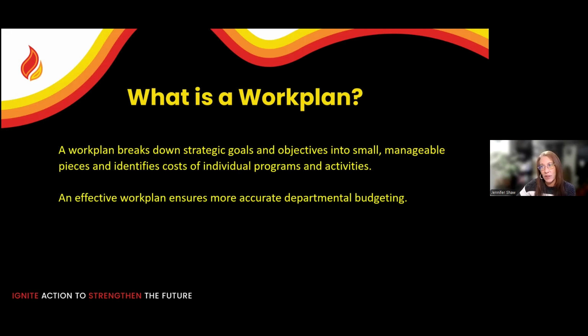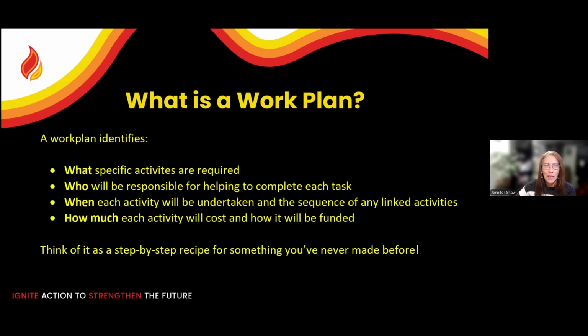So you'll see part of this webinar, we've combined the work plan and budget to show you just how easy it really can be. So a work plan identifies what specific activities are required to meet your goals, who will be responsible for helping to complete each of these tasks, when each activity will be undertaken, and the sequence of any linked activities.